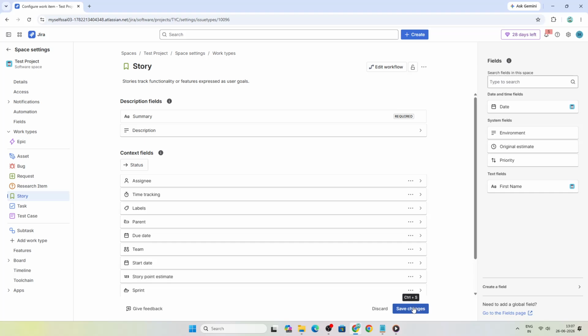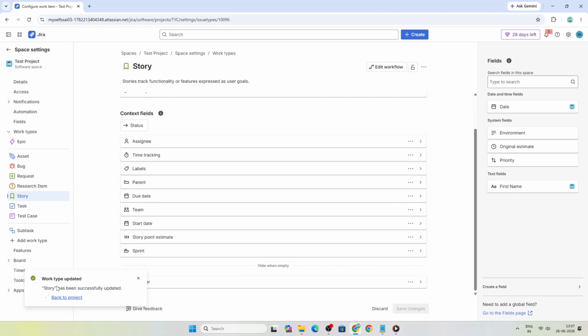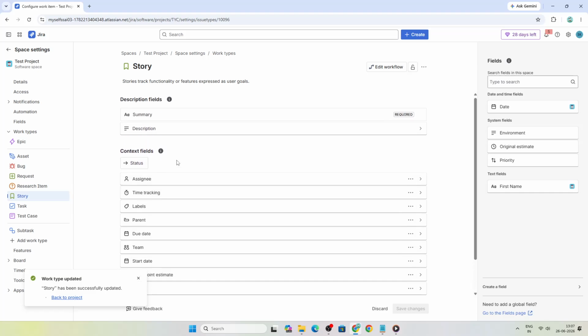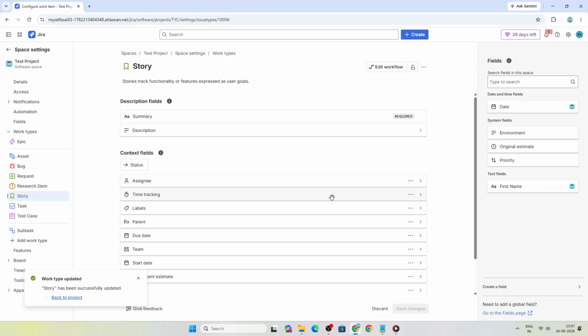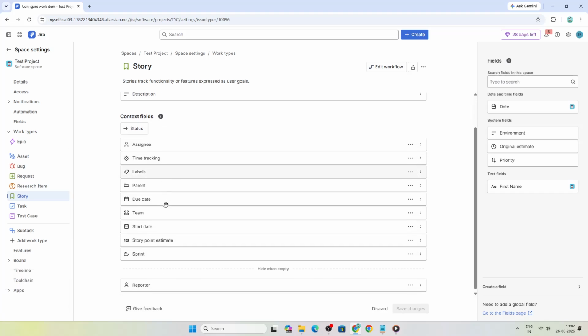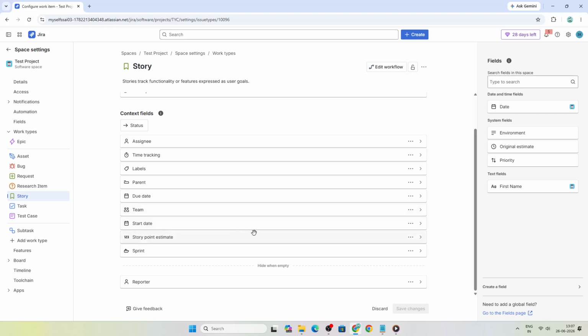You should also confirm that the correct project roles have the Work on Issue permission enabled. Without this permission, users may be able to open issues, but still won't be allowed to record the time they've spent. If time logging doesn't appear to work, this permission is one of the first things to check.